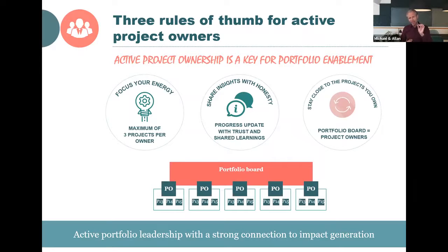And the main idea here is to make sure that the project owner, who will be part of the portfolio board, will also be part of each of the 3 projects. This person will meet up in the project 2 hours every week to make sure that this project is on track and creating impact. And the project owner will also bring back whatever needs to be discussed in the portfolio board. This makes a very hands-on dialogue about the most important projects in the organization.